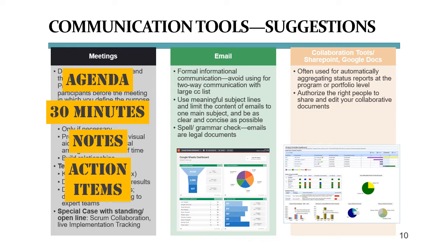These action items and their owners and their due dates are all part of the meeting notes or meeting minutes that will be distributed. To be clear, these 4 rules apply to all the platforms in which you can conduct meetings. That's conference rooms, teleconferences, video conferences like Zoom calls, any kind of interaction in which people talk with one another.